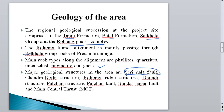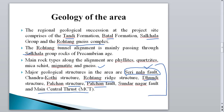Among the major geological structures, the Siri Nala fault is very significant. Due to this fault, the tunnel faced many problems during construction — lots of debris flow throughout the tunnel. This fault was identified during the DPR stage but still caused major issues. Other structures include Chandra Kothi structure, Rohtang Ridge structure, Dhundi structure, Palchan structure, Panchal faults, Sundar Nagar fault, and the Main Central Thrust. These structural features hampered construction work, making structural geology very important during tunnel investigation and construction.